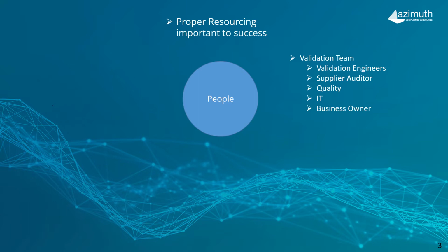The business owner will have the responsibility for writing user stories and the acceptance criteria associated with each story as they are developed. This is a big change from the current validation model where they write their user requirements and are then later in the process writing test scripts around those requirements. A lot more paperwork, a lot later in the process compared to what computer software assurance requires.